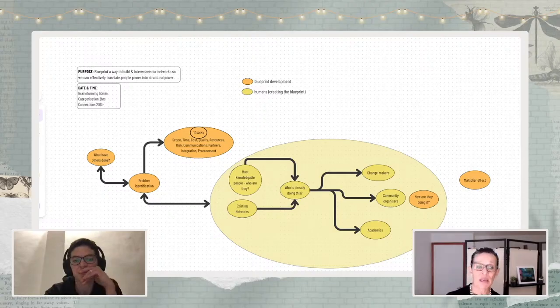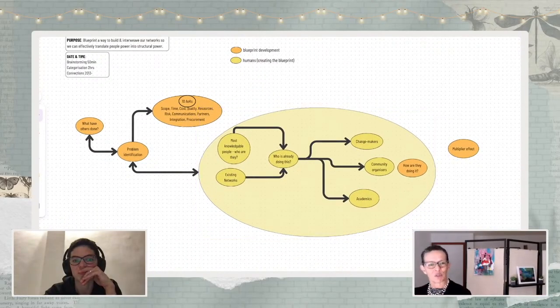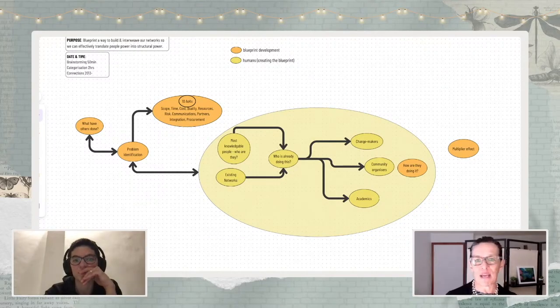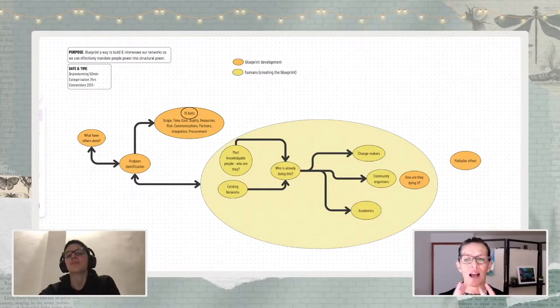If it has a beginning and no end, it could be a problem. And if it has an end and no beginning, there's a gap somewhere, unless that is the beginning and the end of the project. So every bubble has to have something that inputs and something that outputs.